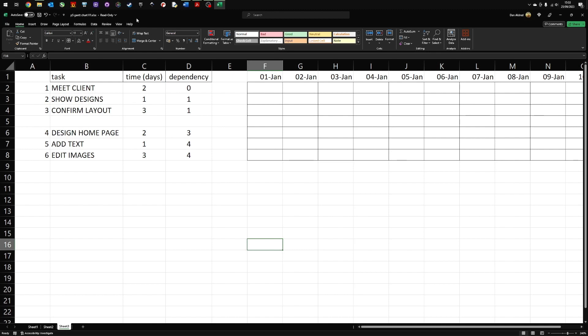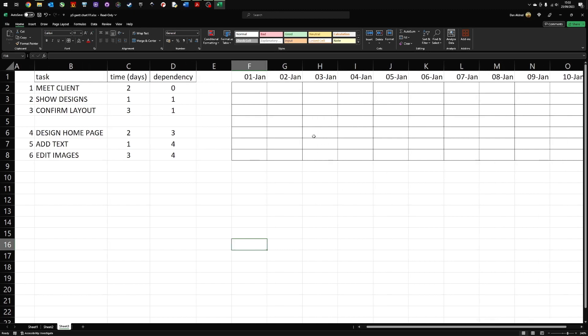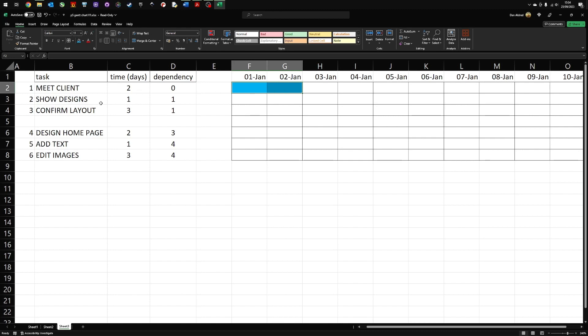Next up is we begin to add in the visualization, build up the Gantt chart. So I'm going to use blue for this. I'm interested in the days. So we're going to start on the 1st of January. Obviously, your days may be different, or dates might be different. So please check them. It's going to take me two days to do that task. Then I'm going to show the designs. But this is going to take one day. But I can't do it until I've finished task one. Task one ends there. So therefore, this is the next task.